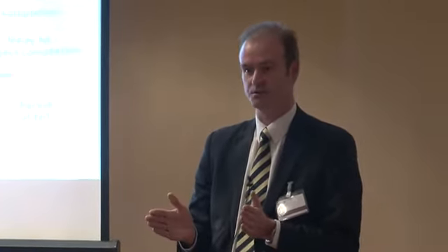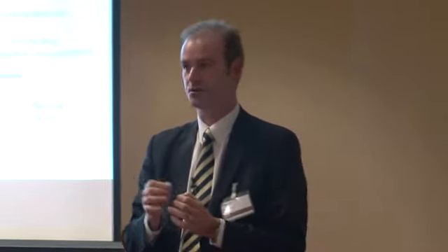because I often find that planners update their program and they start mitigating things immediately, and you lose the measurement of the effect of what would have been the situation but for their mitigation. So that's a very key point. If you do mitigate, make sure you've measured the delay first.